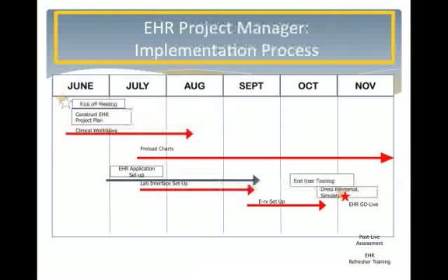Go-lives can either be set up as a Big Bang theory, meaning that all departments go up on the EHR at the same time, or some sites choose a staged approach, meaning different departments or users start using the EHR at different times. Remember, there is no one approach to managing this initiative.